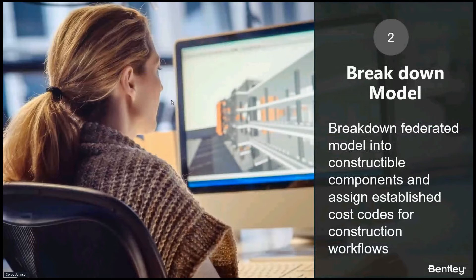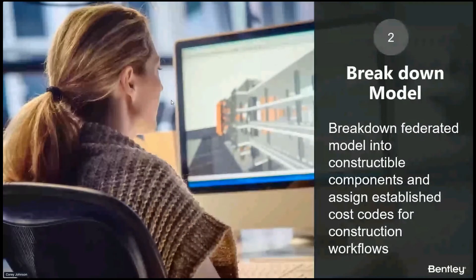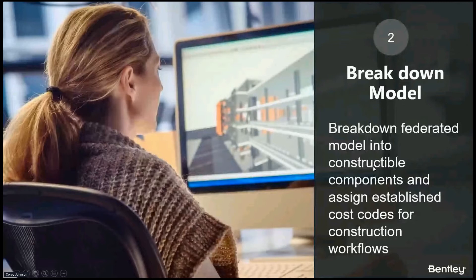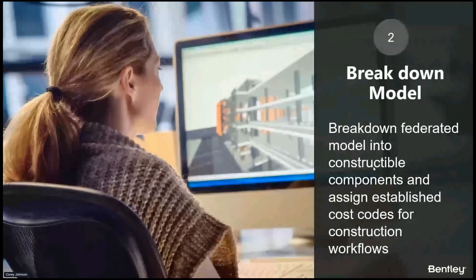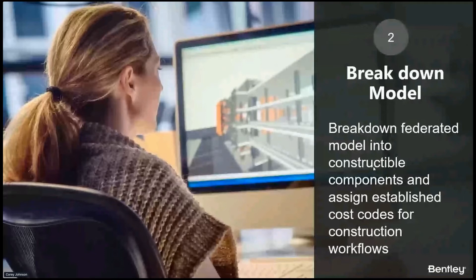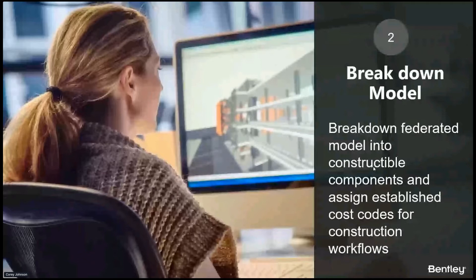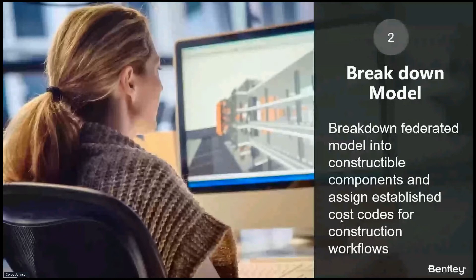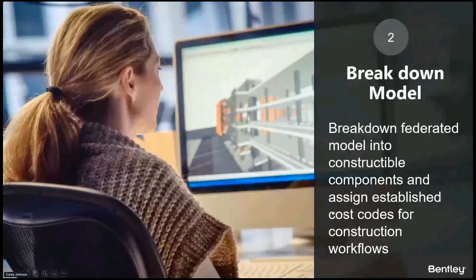So the first thing - we aggregated that model, and then what's the next step? We need to break it down for construction speak, construction language. I need to understand how am I going to estimate and break this down. We don't want to pay designers to break down models for us, because, as good as they are, they never get it right. Construction understands how to break it down. They know how they're going to construct it and assemble it. So let's break this down. But when we do so, we're going to establish account codes, cost codes - everybody may use a little bit of a different term - but your company has historical records of all their cost codes and their historical production rates.